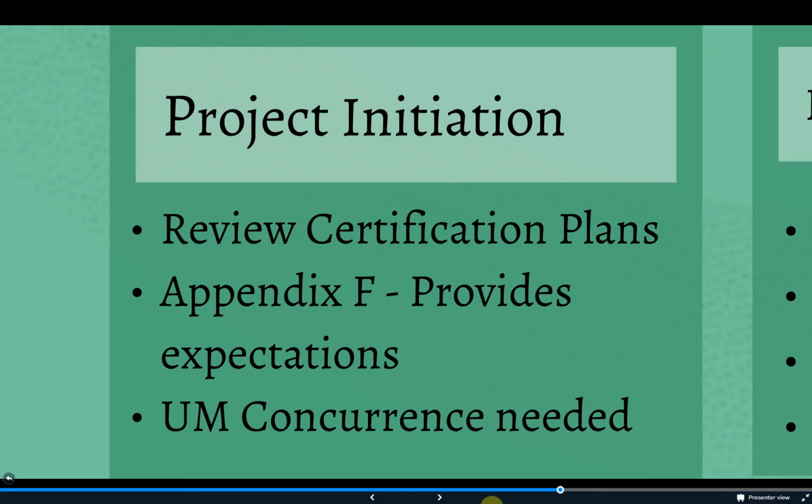Going forward, the conformity inspection plan will also be accepted by each discipline by signature too. Edits also state that when the ODA receives a response letter to the P&L, this will imply acceptance of the conformity inspection plan. After your review as a unit member, you'll be asked for concurrence. Your concurrence indicates that you have reviewed the plan and that for your technical area and authorized functions, what is proposed is accurate and complete.